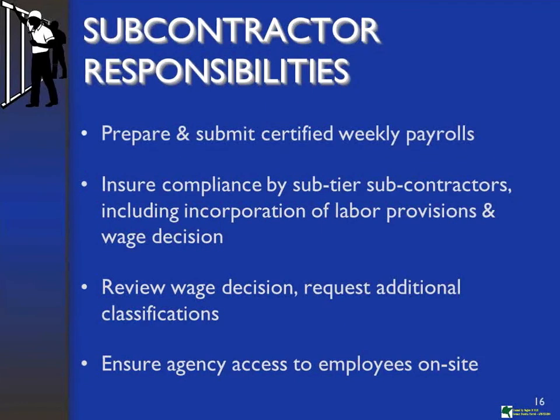Subcontractor responsibilities. They need to prepare their weekly reports and submit them to the prime in a timely manner. That's not bundling them up towards the end of the project, because that doesn't do you any good in terms of administration and enforcement throughout the project. So if you find that you're not getting weekly reports in a timely manner, red flags should go up, and it might be cause for, at least in multifamily, what we have done, we try to avoid it, is to withhold future disbursements until they can get caught up.